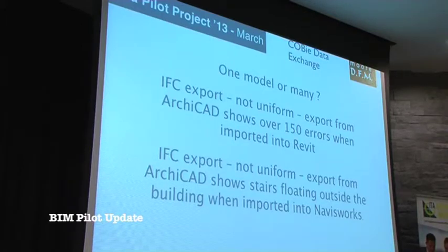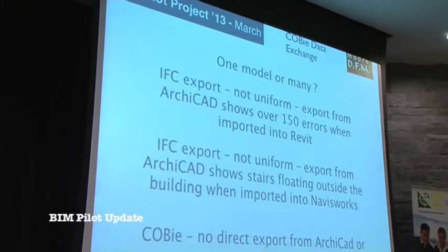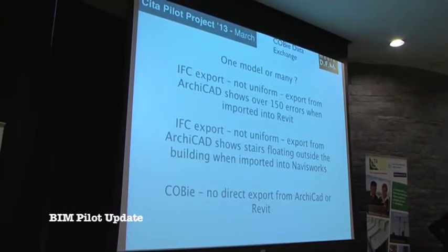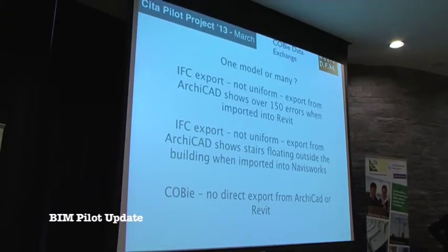I'm sure there's a lot of things we could do, or Bernd could do in terms of refining it, but this is just trying to see how things would work straight out of the box in terms of moving it from one to the other. The COBie exchange format is the single mandated format out of the UK government at the moment, as far as I know, in terms of the deliverables from a BIM level 2 by 2016.